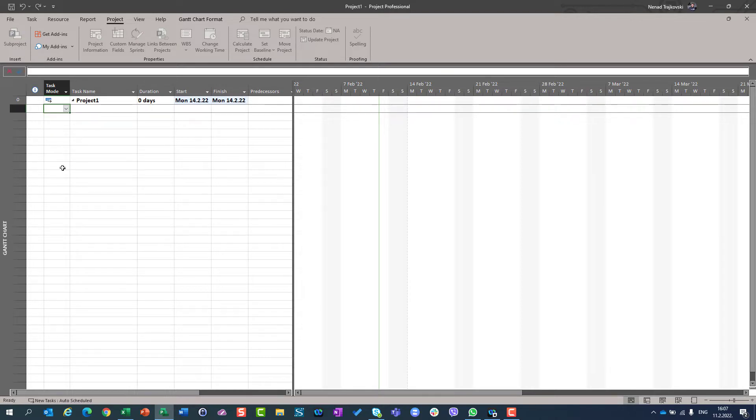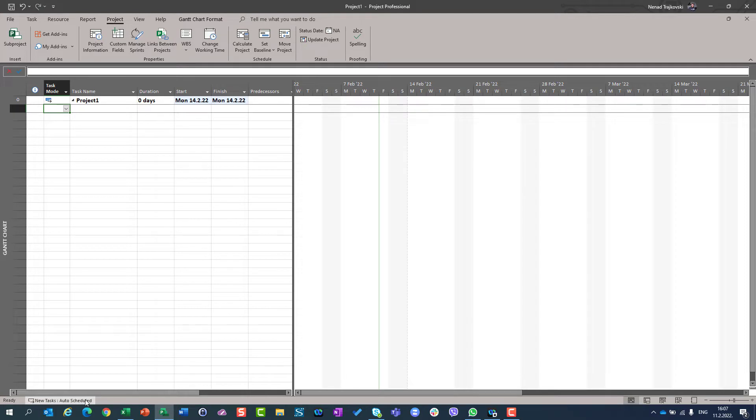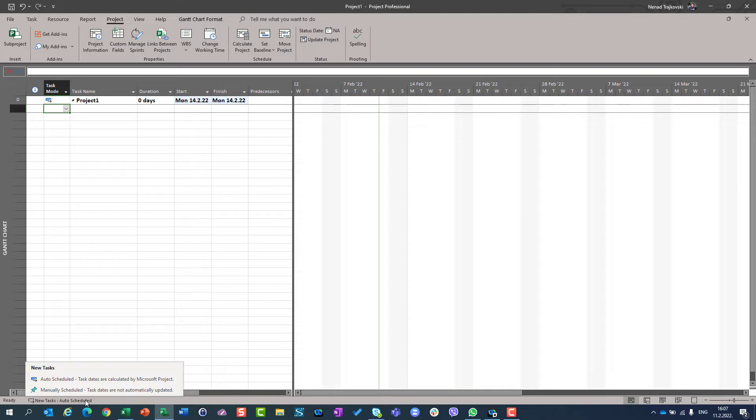So you can, for your project, you can change for new tasks how they're going to be, in which mode new tasks are going to be, by clicking here on the lower left of the screen, and you can choose between manually and auto-scheduled.